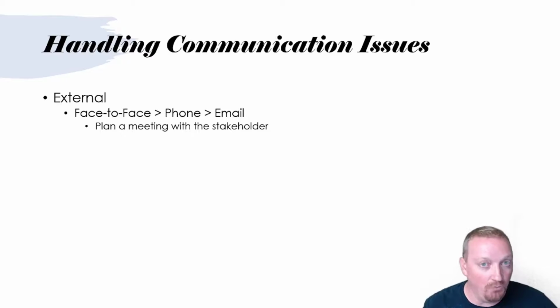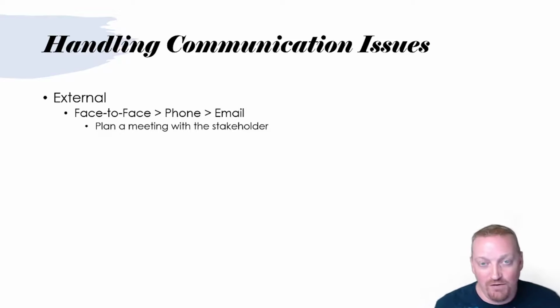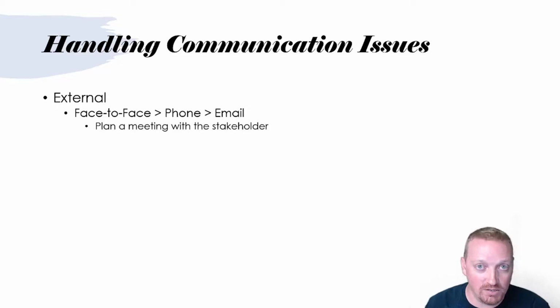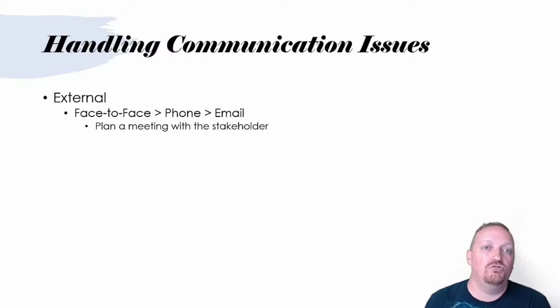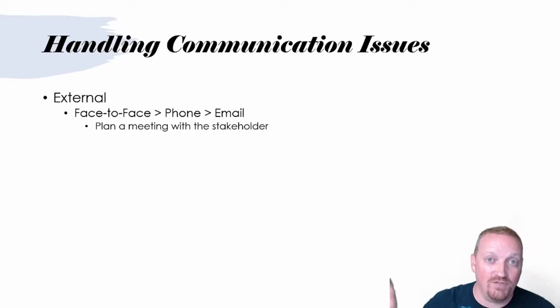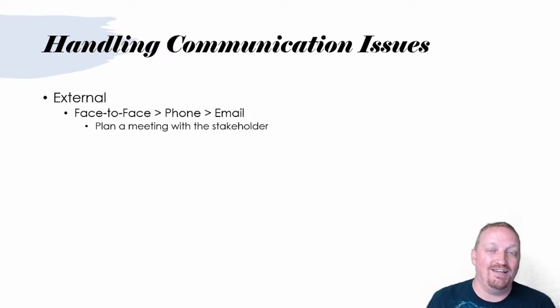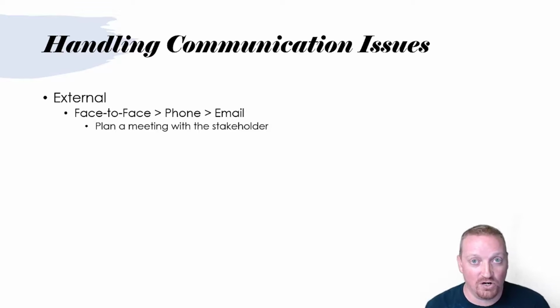Now, I do want to reiterate and emphasize something that I've mentioned throughout this video, and that is, just because you have a communication does not mean that you don't work the story, nor does it automatically mean that you move the story back to the next iteration. But if there are 2 or more dimensions of difficulty, then you definitely have to move that story back to the next iteration until 1 or more of those dimensions are resolved.